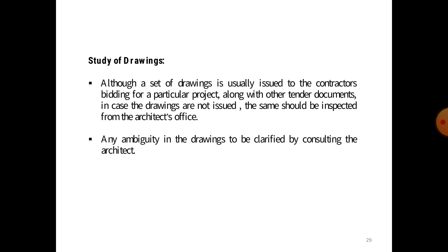with the other tender documents, in case the drawings are not issued, the same should be inspected from the architect's office, and any ambiguity in a drawing is to be clarified by consulting the architect.